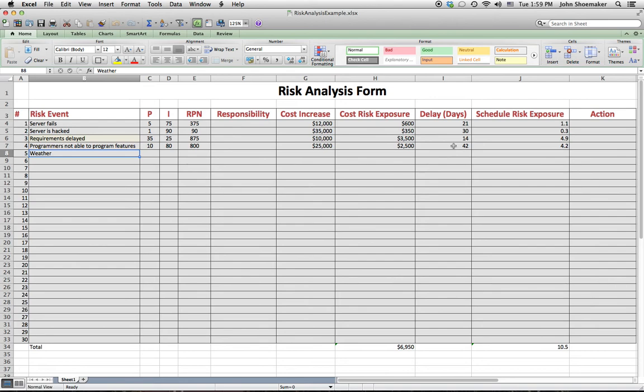And what that means is that if somebody hits a hole-in-one, the insurance company pays them $10,000. It's no longer a risk for us because it can no longer do any damage to the project. We paid an insurance company $350 to take the risk for us.